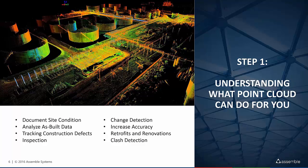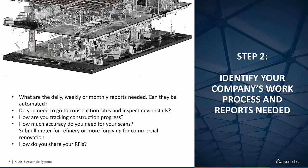The second step is identifying company work processes and the reports needed. What are the daily and weekly reports we need? Can we automate them? For example, a progress report may be needed every week or every day — can we use our point clouds to show what was installed? Can we approve a subcontractor bill for installed items using point cloud, knowing that 100% of listed items are actually installed correctly? Can we scan after each install and run the inspection report remotely?